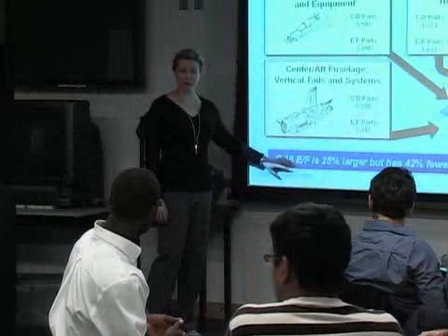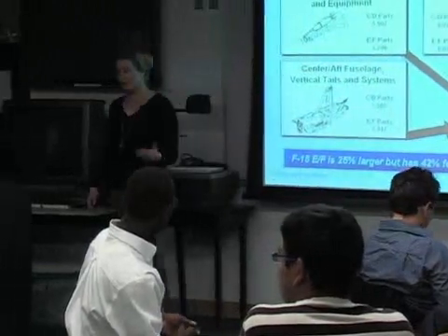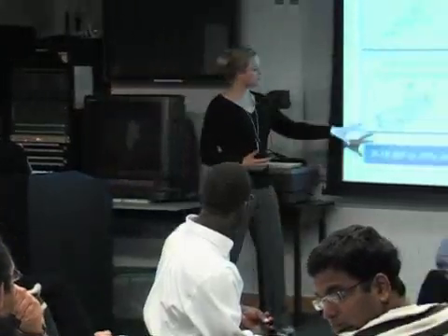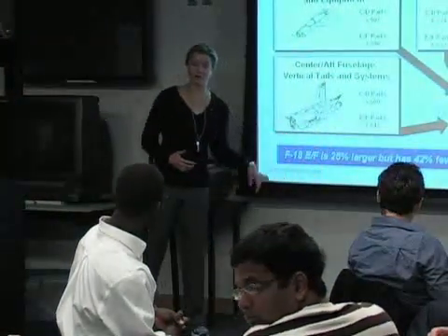Yes, so there certainly was a lot of engineering costs to redesign the plane. And there was an interesting arrangement between this company and the government. So there was some, if you would call it, cost-saving sharing or profit sharing that went on. So the company was incented and rewarded for keeping costs down. They didn't have to give all that savings back to the government. They didn't get to keep it all either, but they got to keep enough that it was an incentive for them to actually meet these objectives.